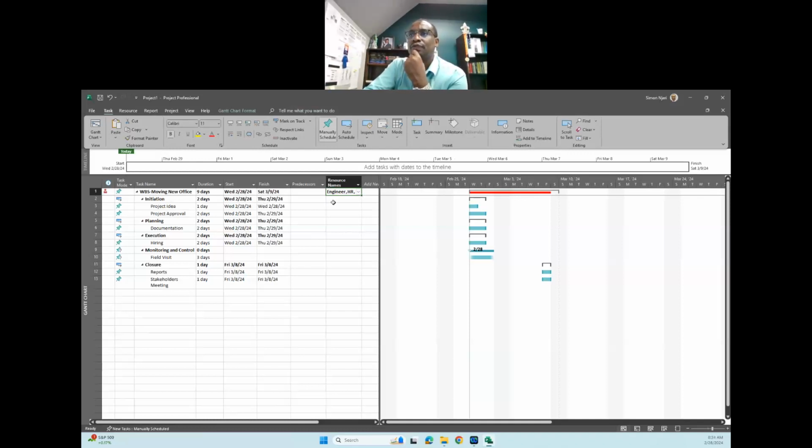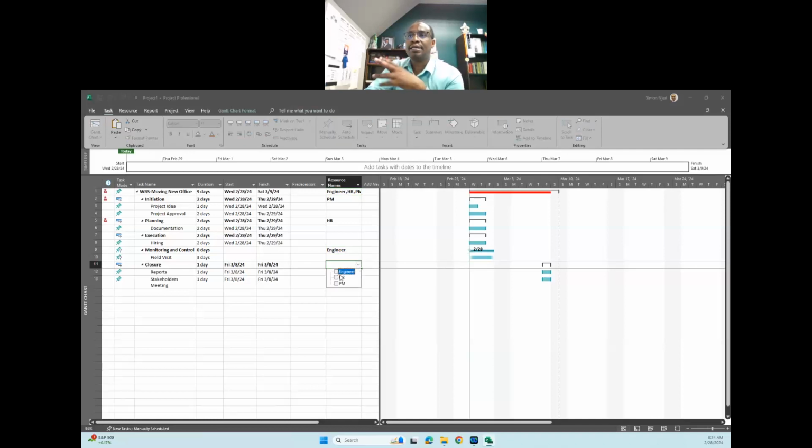So initiation, let's say the initiation will be done by the project manager. Click project manager. Planning will be done by the human resource. And then monitoring and control, let's say it will be the engineer. And project closure, all of them because they will be engaged at some point in time. So already now you have your work well outlaid and well depicted. And this is exactly what I needed from the assignment of the work breakdown structure.